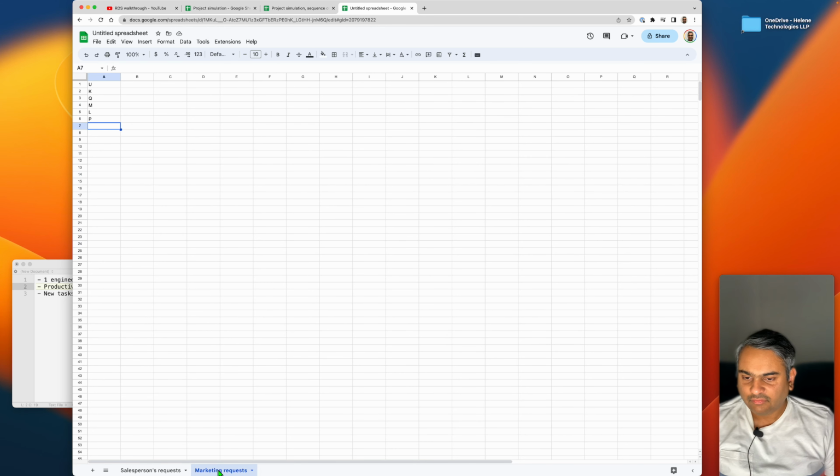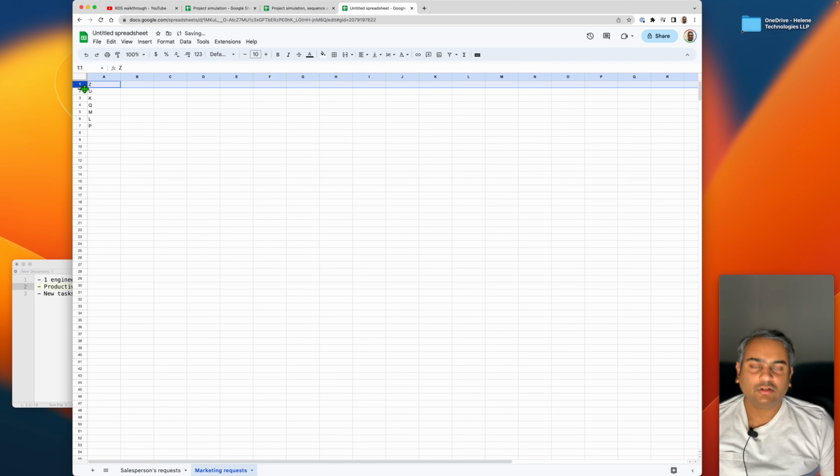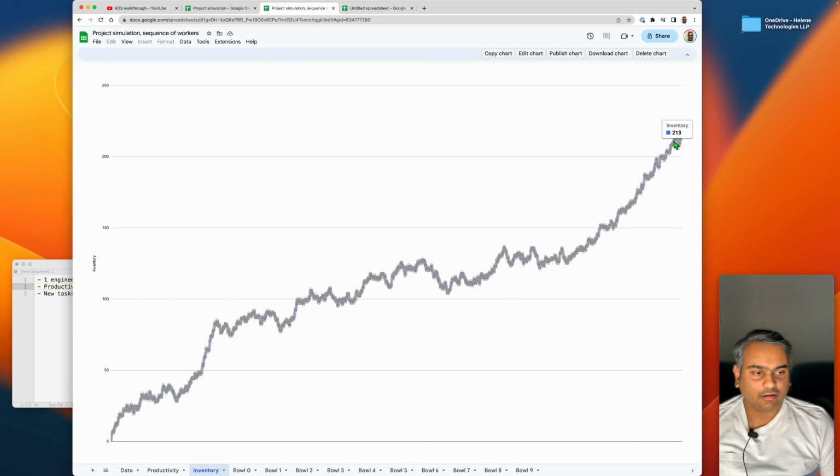And if the marketer comes up with a new task, let's say Z, she should decide where in the priority it goes. She can't say, I want Z. She has to decide where it goes. Does it go to the end, which means it's the least priority, or does it go to the top? Either is fine, but not prioritizing is not fine, because then you get stuck in this huge backlog and everything can't be important.